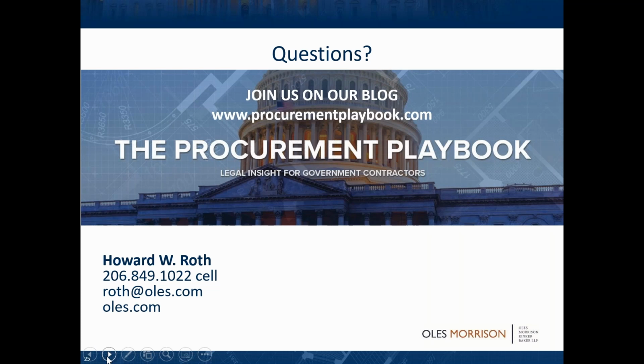And my add-on to that for the audience is, if you have that kind of circumstance, reach out for assistance, whether you speak with an attorney or a consultant. Definitely seek the help you need to resolve that before you lose that time and before it becomes consecutively worse. Right, because under the changes clause in government contracts, you've got this duty to proceed. Whether they're paying you or not, if they've told you to proceed, you've got to, and so you're incurring these additional costs, and the only way you're going to be made whole is to get paid on your REA, and if that doesn't work, then to get paid on a claim.